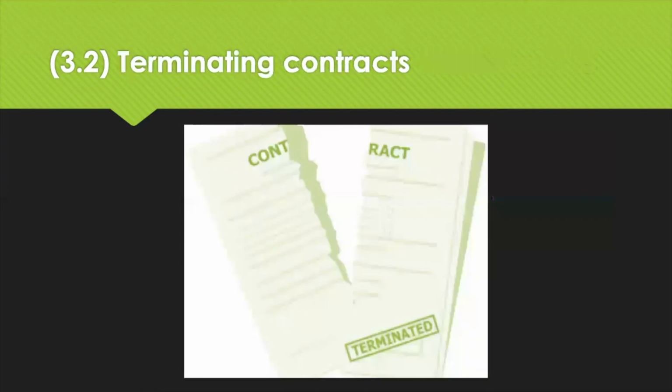The reasons for terminating a contract would be if there is unsatisfactory performance, if one party refuses to perform their obligations, if there is a breach of terms like confidentiality, if one of the parties goes bankrupt, if there's a change of ownership in one of the parties that may result in a conflict of interest, if a party may no longer be able to fulfil its contract due to the availability of resources or cash flow, and if there's a major or fundamental breach.